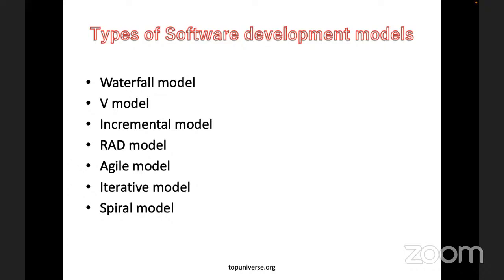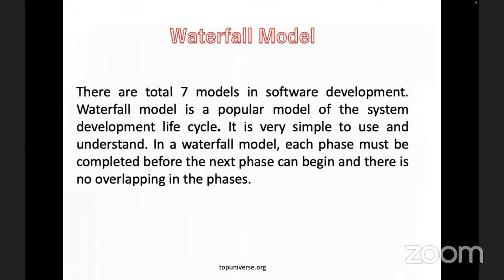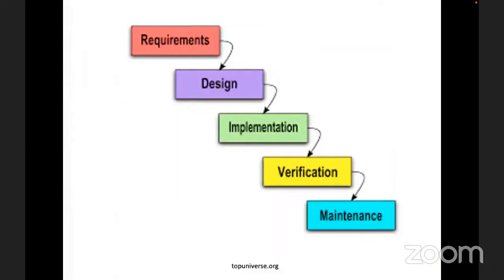The success of the waterfall method depends on the amount and quality of the work done on the front end as well. So we're going to run through 5 common stages in the waterfall process. Usually it starts from the requirements, which I usually call the requirements analysis. Then we have the system design, the implementation, the verification, and the deployment and maintenance.